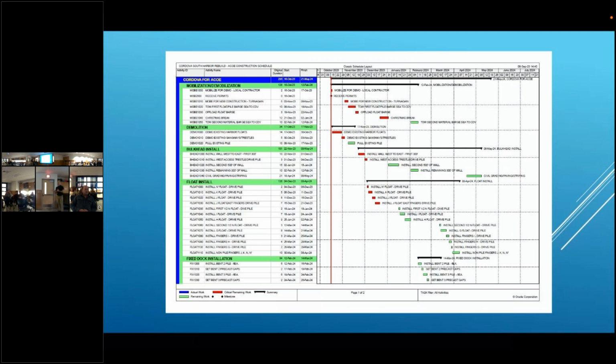And so the way demolition will work, we've had some contractor changes with demolition, but we're working through that. It's all going to get pulled apart and then craned over Nickoloff to that lot on the south end where the memorial is and the start of the walking path on the break wall. That's going to be the staging area. Put all the floats in there, and then from there they'll get picked up, put on a truck, and trucked out to the landfill. So that's the plan.